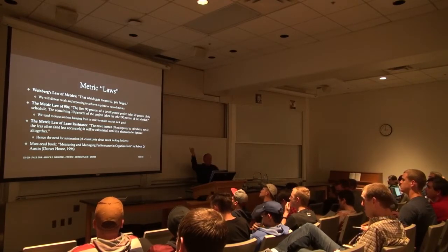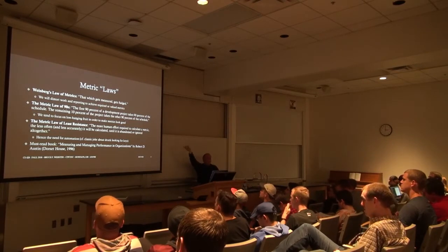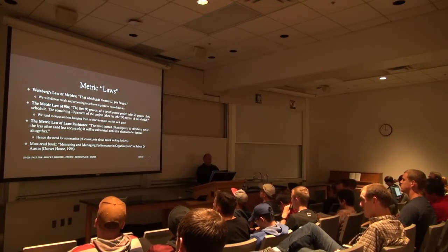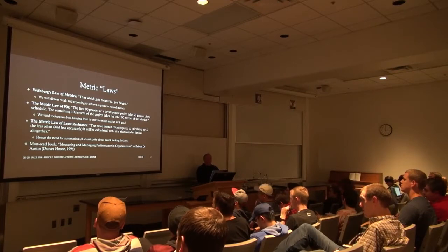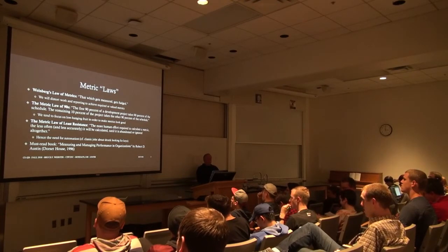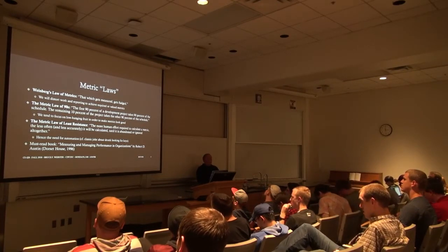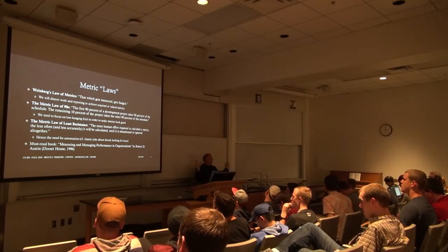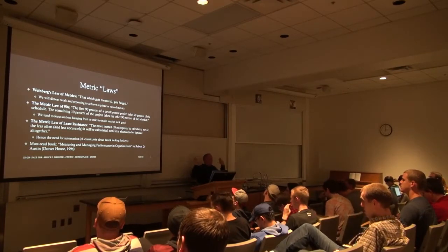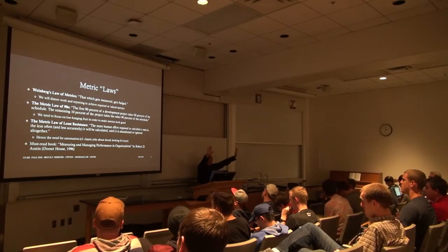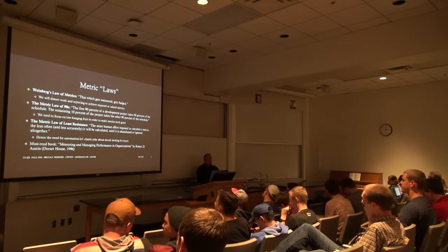Metric law of 90s, we've already quoted this. I didn't make this up. This has been around for decades. The first 90% of the project takes 90% of the time. The remaining 10% takes the other 90% of the time. This is the issue we've already talked about. We go after the low-hanging fruit. We push all the hard problems to the end. I can't tell you how many times I have seen this.